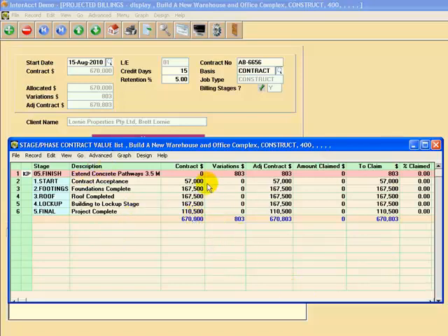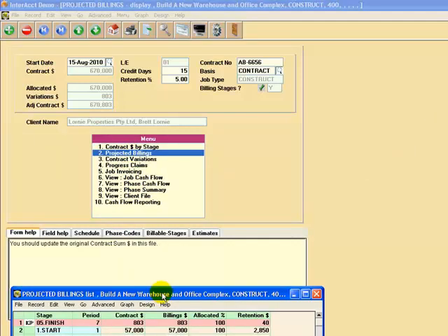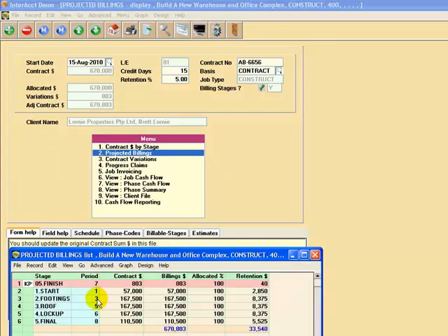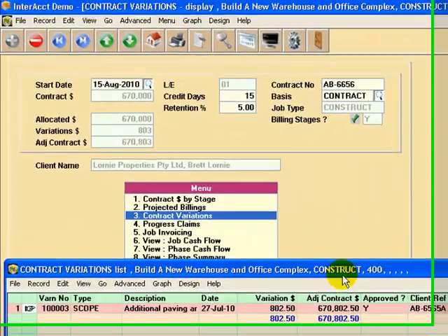So we've defined the contract value, we've broken it down by each of these phases, and we've also done predicted billings based on the period under which we're going to do the work. And in this case we've got a variation coming in period 7, but all the others are listed out in terms of the period under which we're going to start the job. Period 1 being when we're going to start, in which case we've nominated it being this project starting in August 2010.